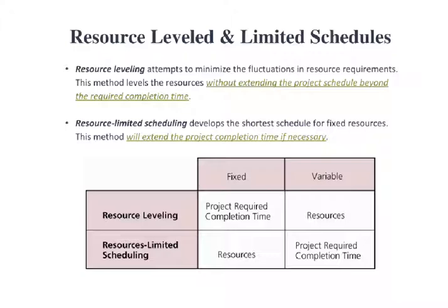And there may be a penalty or price to pay because of that. Often many contracts will have a clause that if you don't finish the project on time, there may be some type of a financial fine or a penalty for not completing the project on time. And so there's a cost to be had with this idea of resource limited scheduling, but perhaps it's simply required due to the limitations that are present on your project.